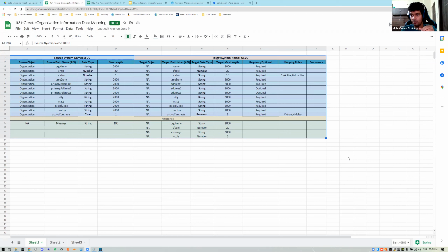My source is mobile. The moment I give it to him, hey, this is the request, this is the response that you will get, he does not have to wait for me to completely develop my Anypoint Studio project, which means that he can develop his mobile application, whatever the UI application, based upon my design. Because he knows what request and response to expect, and what credentials, like client ID and client secret, I'm expecting in the header, so he can configure that. So this is why we are starting with design first.